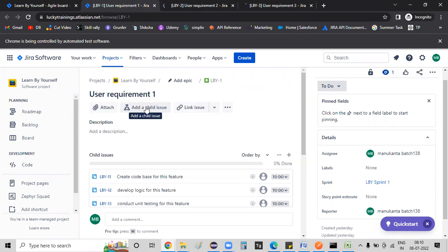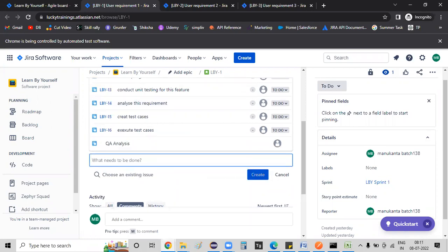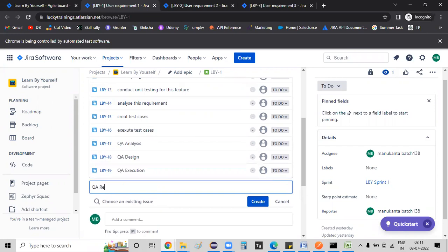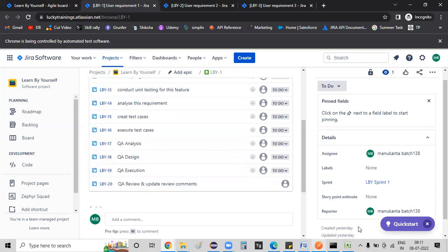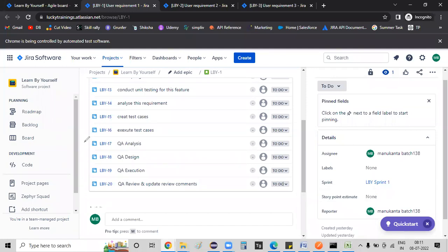The child tasks for QA are: first, QA analysis — this is the first activity; QA design; QA execution; QA review; and update review comments. This is the task. Testing consists of four different tasks.